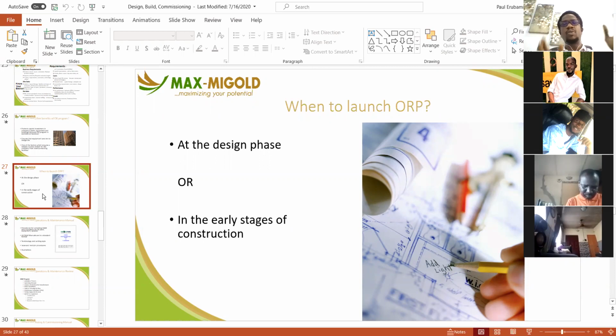So they have those, but those are all construction or project focused objectives. If you bring in operational readiness as a fourth objective, what you get is that there's now consideration for the long-term impact or implication of all actions to be taken throughout that construction process. It now becomes four objectives: three project management objectives and one facility management objective, which automatically becomes overriding, because the whole reason why you are building for these three objectives is to deliver to FM, is to make sure that the facility is usable by the users and value can be created. And because of that, these four objectives become very important. So when you are working with the owners to develop the brief at the onset, ensure that the fourth objective, which is operational readiness, is built into your planning.